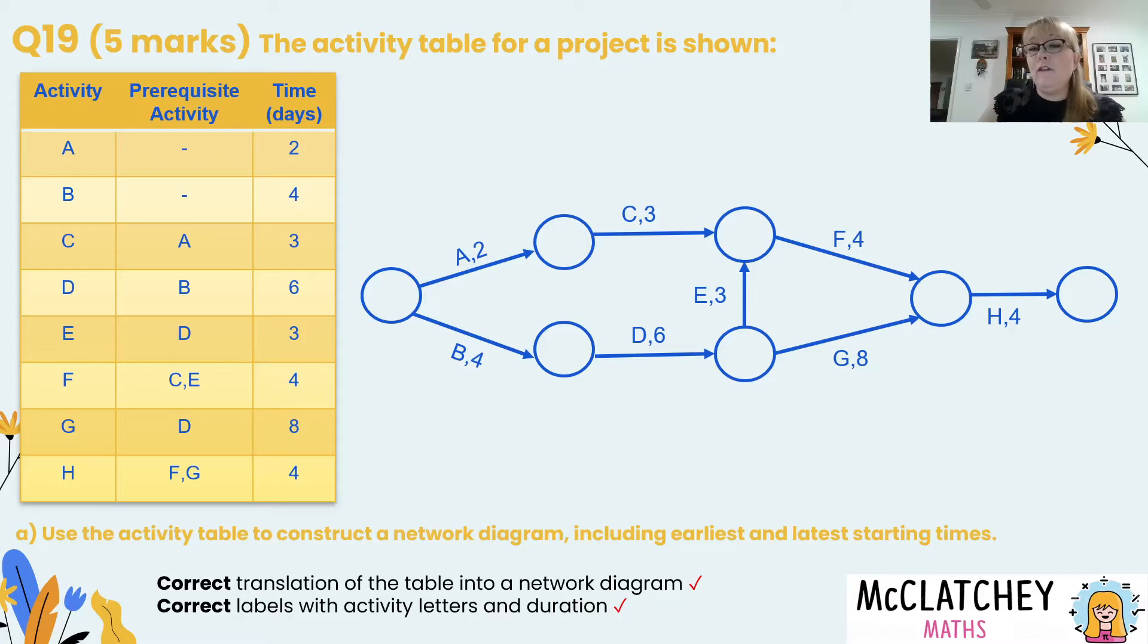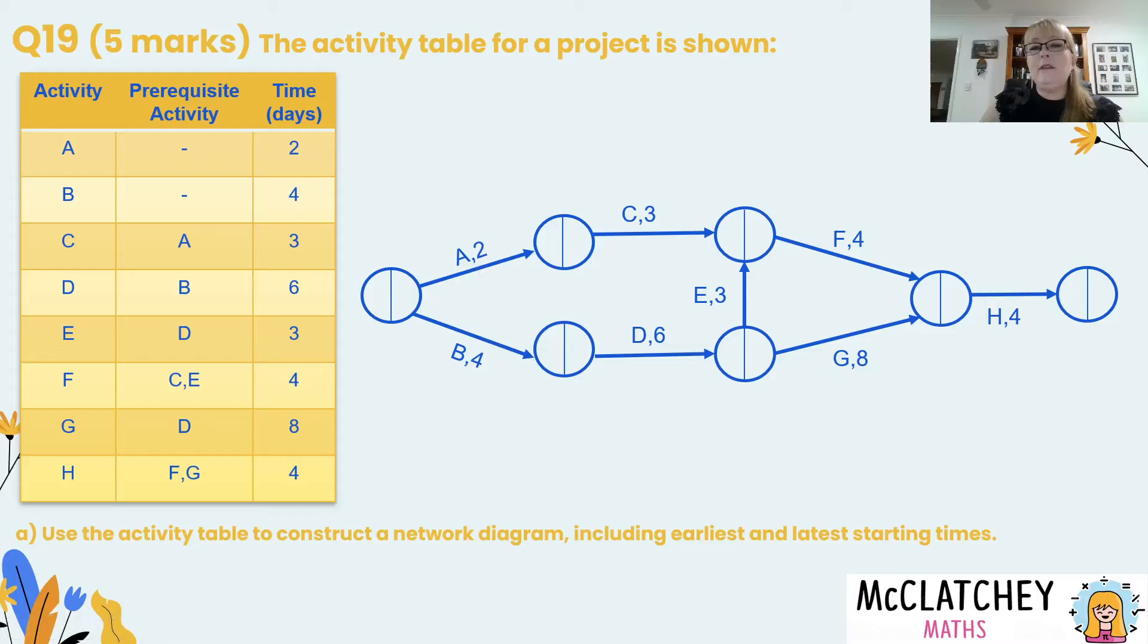Now we're going to also get another mark here for these labels so it's important that we make sure we've got the activity letter and the duration. If you'd left the duration off you wouldn't have achieved that mark and you need that duration to forward and backward scan through your network so it's important to write that. A lot of people make the mistake of drawing the activity and the duration in the vertex. Remember with these kinds of diagrams it's always drawn on the edge.